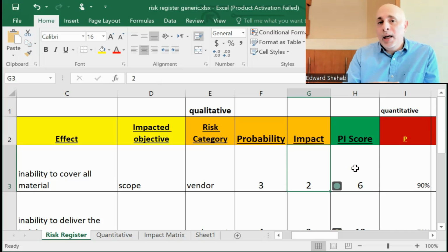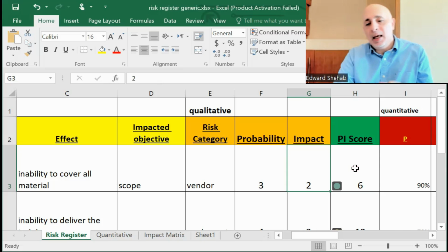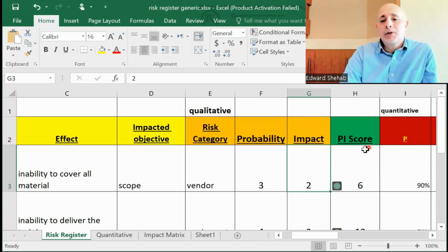And if you're wondering when in the meeting, I would say it should be one of your first things that you discuss on your status report. It should be the outstanding risk that probably you need help with, or you want to remind the team about. If it is red, it shouldn't really be discussed. It should have been mitigated. So if anything turns to red, you need to change your plans to mitigate that specific red risk. And we'll talk about this in a little bit. So this takes you to the end of qualitative analysis, and you have the scores.